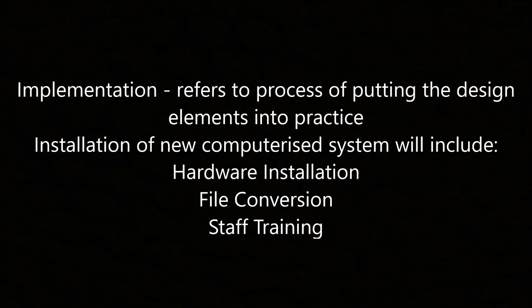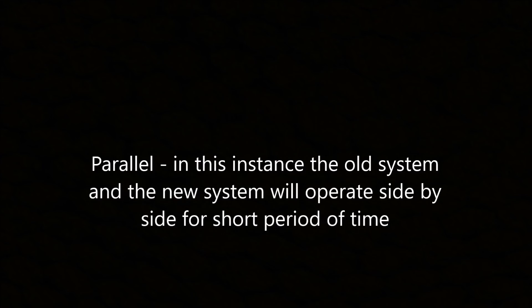Implementation refers to the process of putting the design elements into practice. The installation of a new computerised system will include hardware installation, file conversion, and staff training. Parallel implementation is when the old system and the new system operate side by side for a short period of time.